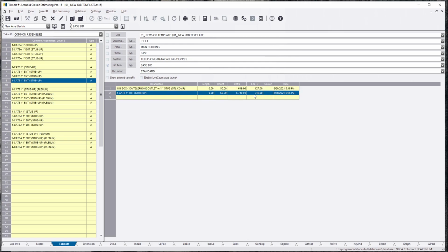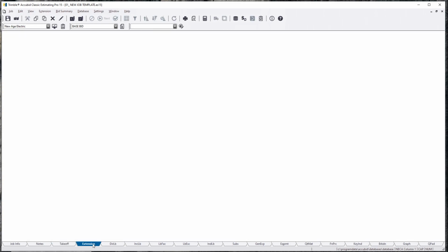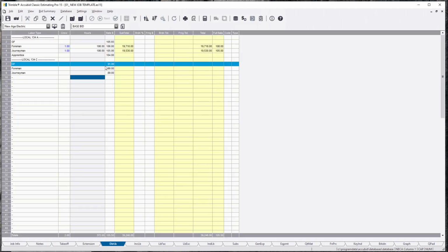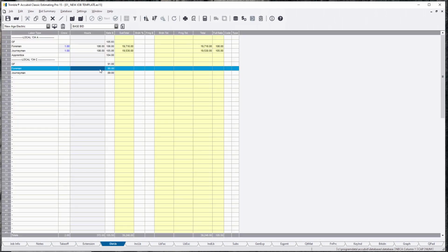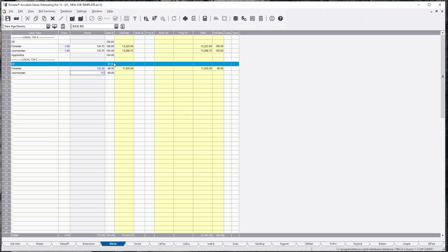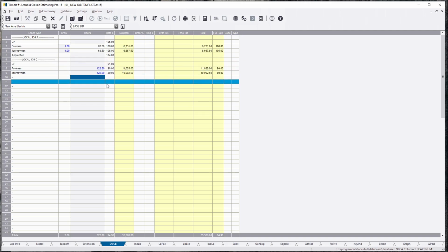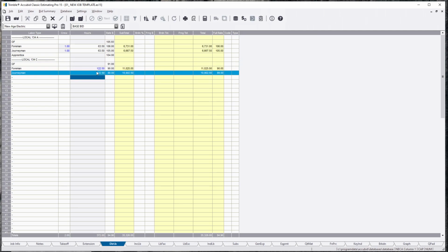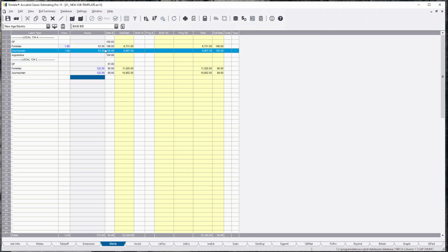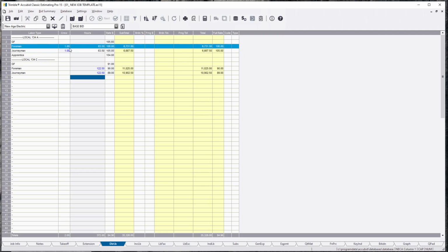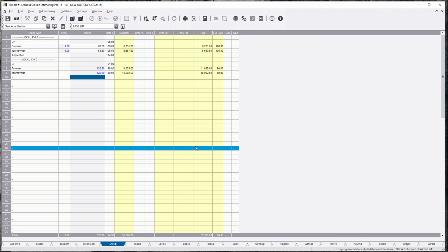It's 245 hours, and I'm going to say that I'm going to have one foreman and one journeyman C card both doing it. So I'm going to divide those hours in half, and that's how we came to that screen. When you plug something in here, it's going to take it directly out of your overall hours, saying that there's going to be one foreman, one journeyman crew.